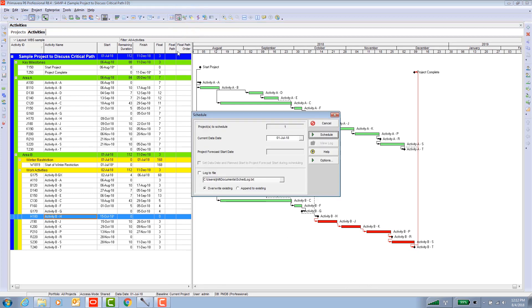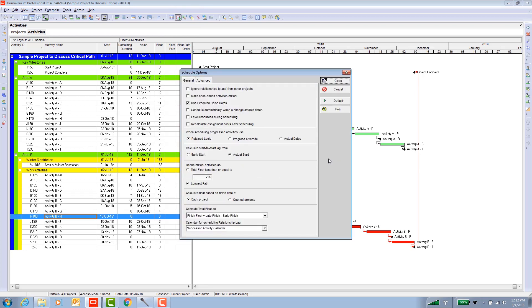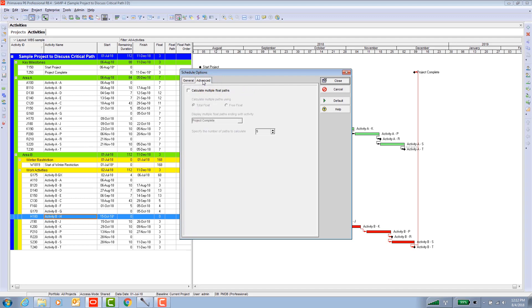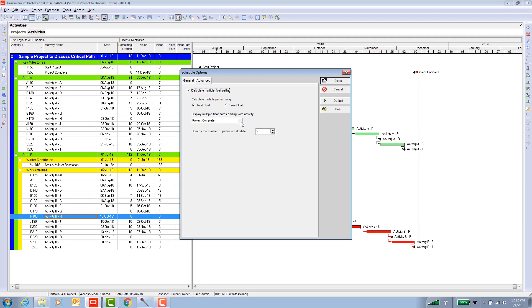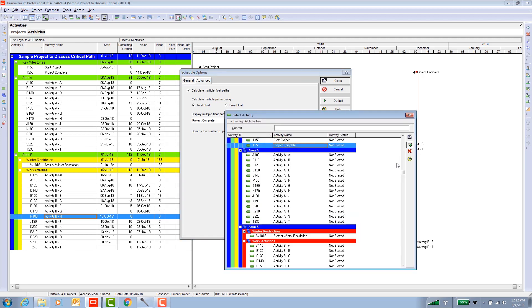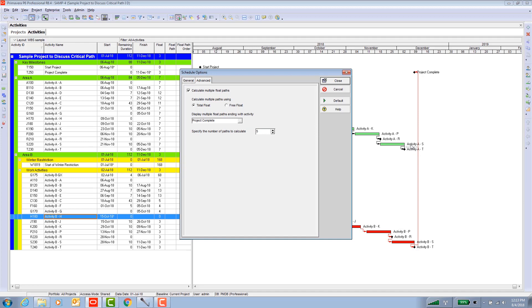Where do you find that? You find that on the scheduling function screen. But before you hit schedule, open up the options and go to the advanced tab whose sole purpose is to offer this function to you. Create multiple float paths. We're going to choose total float. Today's discussion is not about total versus free float.